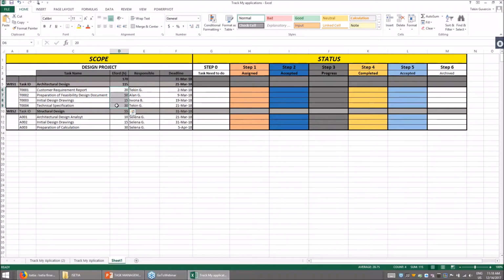I am having, for example, some estimation that customer requirement reports need to have 20 hours of involvement of Tekin, and the deadline for it is 2nd March 2018. All right? And another task, preparation of feasibility study design documents. It requires 50 hours of Alan's involvement, and the deadline for it is 9th of March. So this is the task ID.